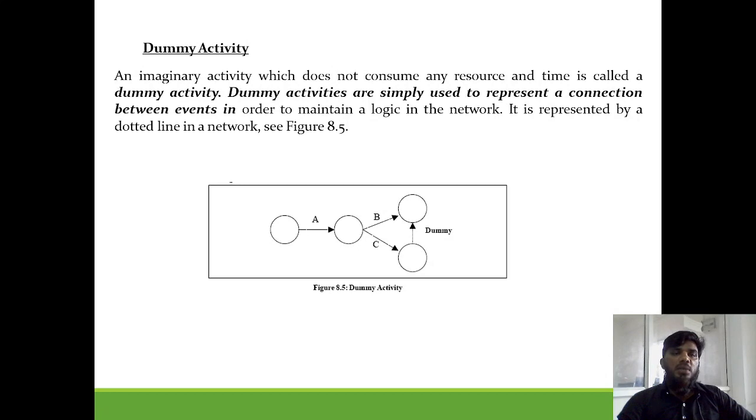Next is dummy activities. These activities do not consume any kind of work or any type of resources. But why do we go for dummy activities? Nothing but to close the loop, or to have a logical network circuit.